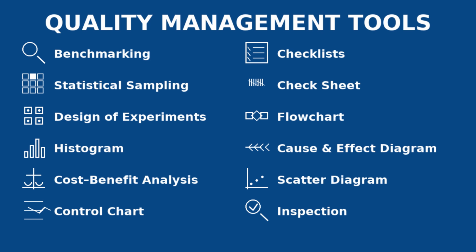We'll move on to the next project manager in this office room, who is actually measuring 3 doors produced out of 100 doors in total. This project manager is part of a construction project. He is actually measuring 3 doors produced out of 100 doors in total. What is he trying to do? He is using a tool called statistical sampling. Statistical sampling is all about selecting the subset of data for inspection to reduce effort while maintaining confidence in quality.